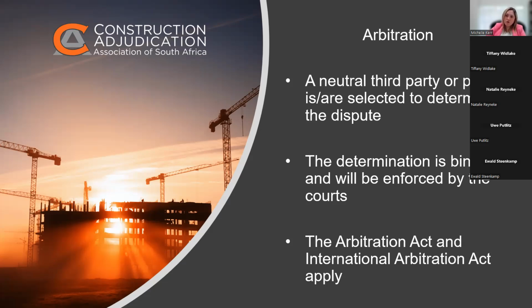Similarly with the rules. In our adjudication agreement that we've hopefully concluded at the commencement of the contract or prior to the commencement of the contract, we should have stipulated these are the rules that the adjudication will follow. This is the submission. We have 2 weeks to make a submission. The other party has 2 weeks to respond. These are the powers of the adjudicator. The adjudicator only has the powers that are conferred on him by the agreement between the parties.